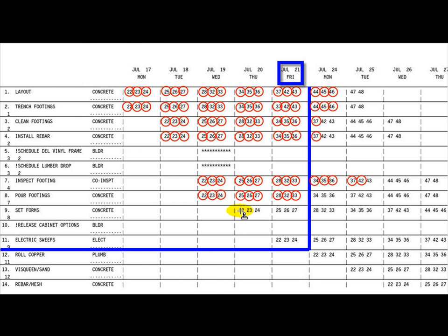This is an example of progress being entered for this time period. The circles represent which units have been completed for this particular activity. It shows how easily anyone can mark the master schedule for progress and what an excellent training tool it is. Completed means that the next scheduled operation can now begin. Reports from subcontractors can assist in recording current progress. You will notice that the electrician did not complete his scope of work on Friday. We will show you the significance later on in this video.